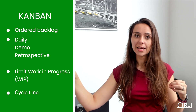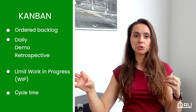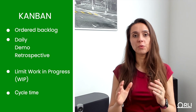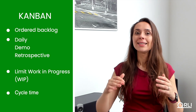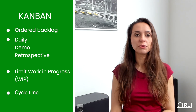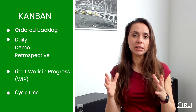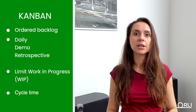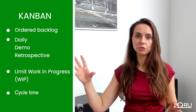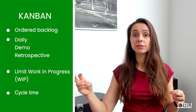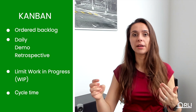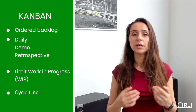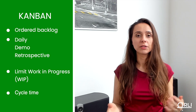In Kanban, we take one item and make sure it passes through all the stages of development until it's done, then we pick the next one. The golden rule of Kanban is to limit work in progress. For a team of four, don't have more than six or eight items. Each team must define their own WIP limit — without it, Kanban becomes chaos with lots of things started but nothing finished. The key metric is time to completion, measured as cycle time.